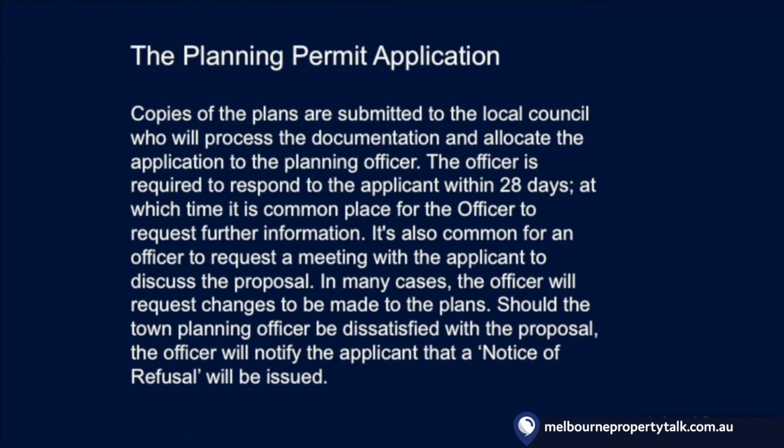For the planning permit application, copies of the plans are submitted to the local council who will process the documentation and allocate the application to the planning officer. The officer is required to respond to the applicant within 28 days, at which time it's common for the officer to request further information.